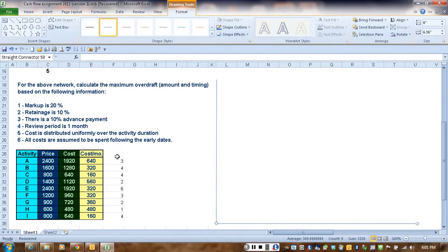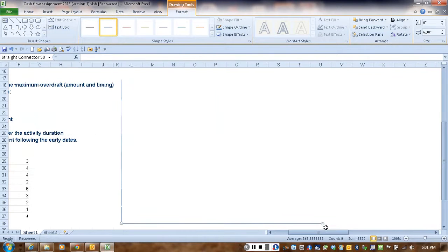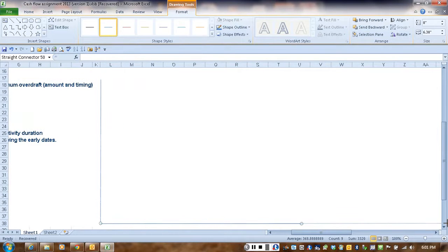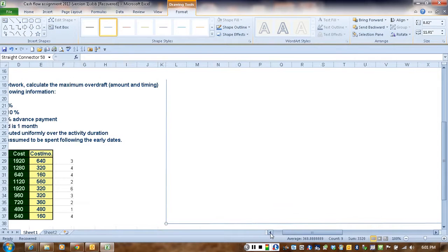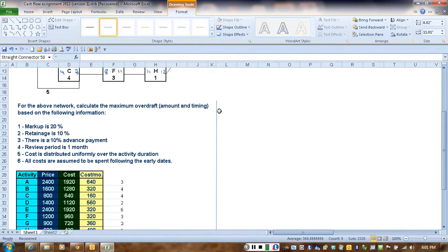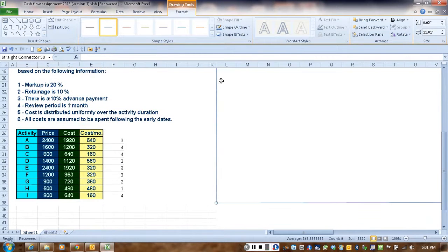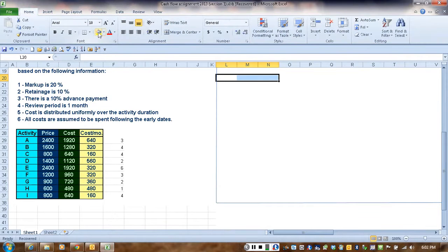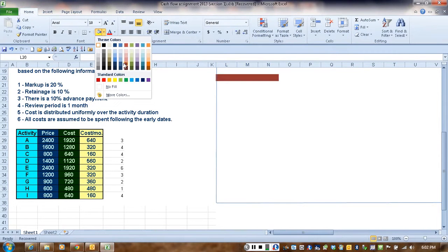And we're going to start, we can actually extend this line to have 18 cells. Okay, and then we're going to start plotting our activities. So activity A is going to start on 0 and end on 3. So it has a duration of 3 cells: 1, 2, 3. And I'm going to highlight that like this.